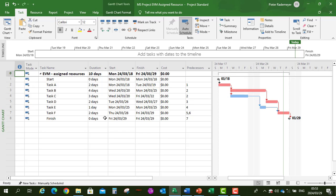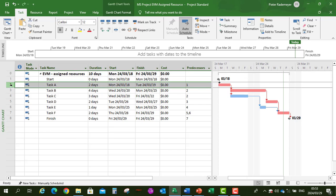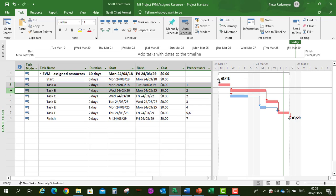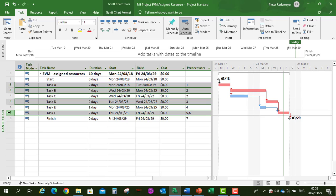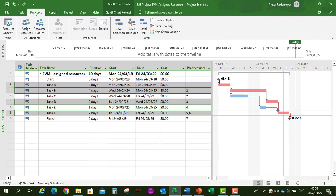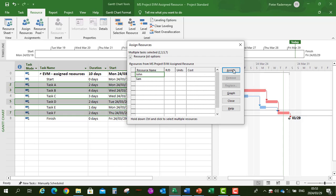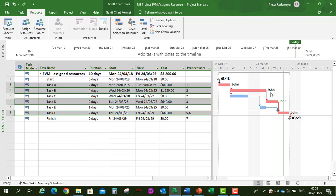Now we're going to assign our resources to the specific tasks. Click on task A, hold Control on the keyboard, then task B, task D, and task F. Go to Resources, Assign Resources, and assign John. John is now assigned to tasks A, B, D and F.